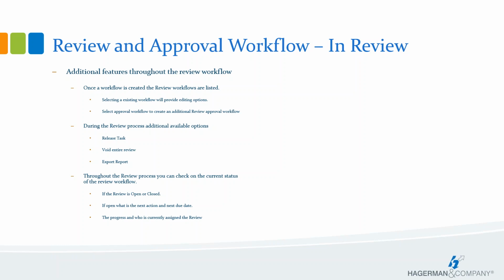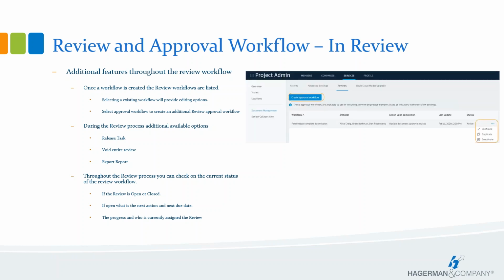In addition to the review workflow, there is now available some BIM 360 enhancements. So I wanted to just kind of mention those. If you've looked at this before, you may not be familiar with them. Once the approval has been defined by the project admin, the existing predefined approval workflows for the project are displayed on a review tab of the project admin module. Project admins can access existing approval workflows to configure, to duplicate, or to deactivate.